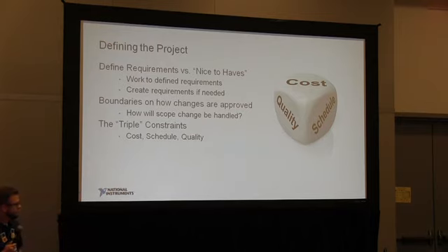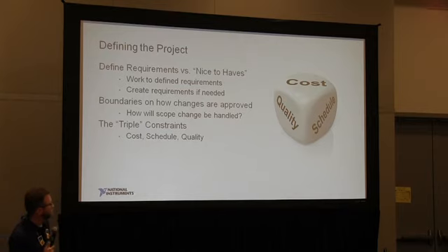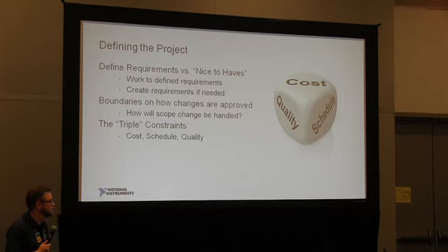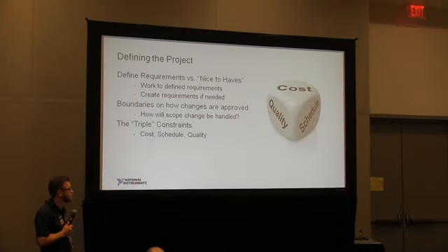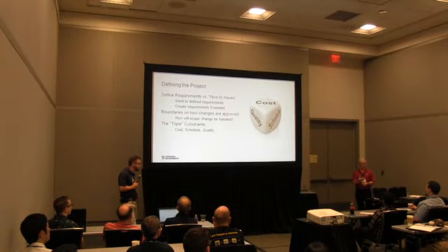In past projects, we've had an issue with the user interface requirements. We had one project where there was practically no definition about the user interface, and so we created what we thought would be a solid, robust user interface. When we delivered it to the customer, they said, well, where's this, and where's this piece, and where's that? It was a frustrating experience. So ways that you can identify the user interface requirements is another piece of defining the project. Also, any calibration needs, how you're going to store the data results, what's the reporting format. These are all things that you can identify early on in the planning stage.